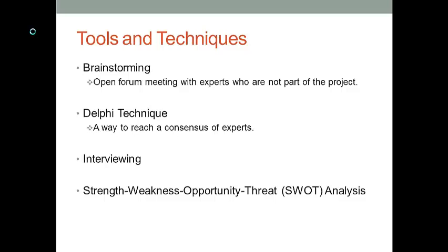Another option is to perform a SWOT analysis. SWOT represents strengths, weakness, opportunity, and threat. When you perform a SWOT analysis, please note that strengths and weakness refers to the internal factors from our project. Opportunity and threat refers to the environmental factors.